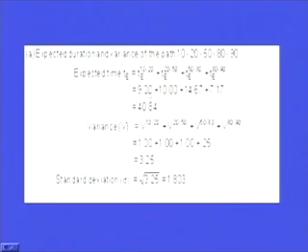formula that is used to calculate the expected time from the optimistic, most likely and pessimistic time given for each and every activity. So we calculate the expected time for each and every activity, and then we calculate the total expected time for that particular path. Now variance is also added up, variance for each and every activity. There are 4 activities on this path, 1, 2, 3 and 4.